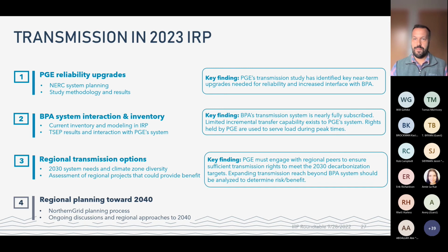Yeah, Jake. Yeah, thanks. I appreciate Lynn acknowledging the BPA timelines, and I feel like somewhere in the backup slides I saw that you had Bonneville's in-service dates listed out, and acknowledging that they didn't have the full timelines. Reframing that a little bit, you are obviously most focused on the Big Eddy Chamawa 500 upgrade. That is a new 500 line through Spotted Owl territory on the north side of Mount Hood, with a whole new right of way that'll have to be procured.